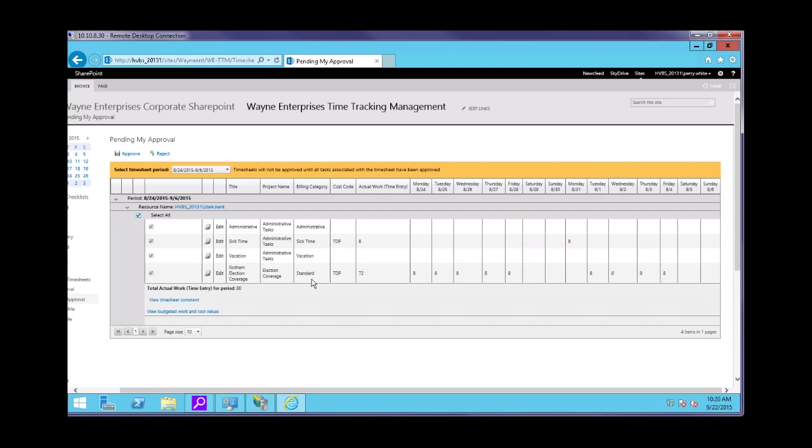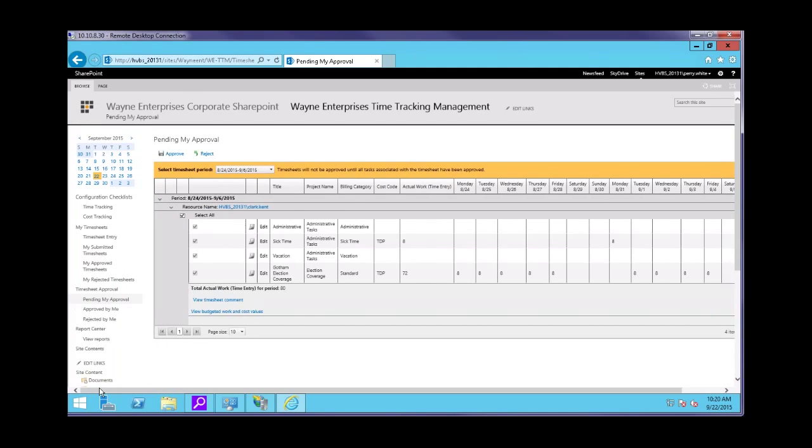This will force your employee to redo their timesheet and resubmit it. If an employee has submitted a timesheet in error, you have to reject it. Once you submit a timesheet, it does get sent for approval, and it is no longer editable. So if an employee walks over to you and needs it rejected, please just reject it for them.